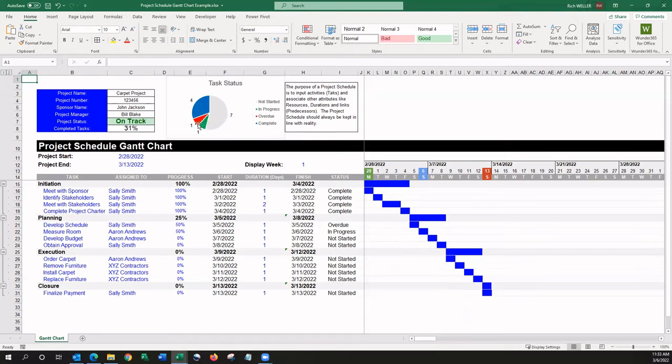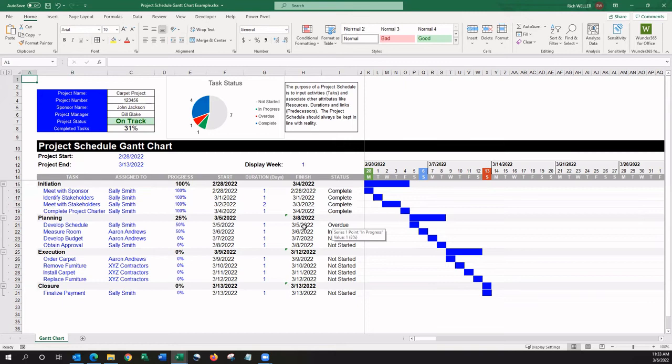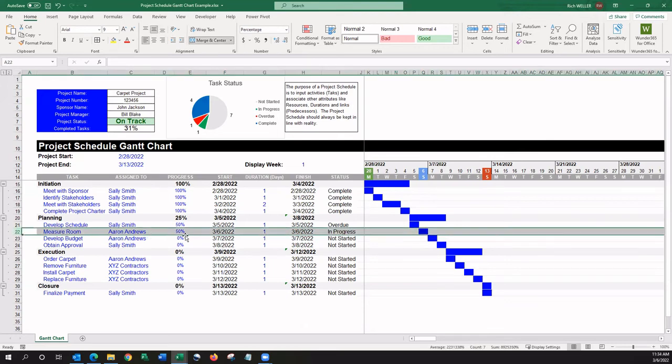We can see one task that is showing as overdue. And if we look down below, we can see just exactly which task that is that's overdue, given that today's date is the 6th, and this task is only 50% complete, and it was targeted to complete on the 5th. So, this task is overdue. The next task, the major room task here, is the one that's in progress, and it's the one that's showing up in green.